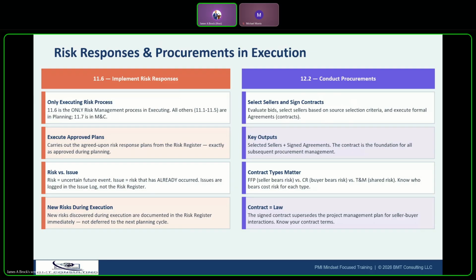Then there is time and material. Time and material contracts are kind of a hybrid of the two, right? So the risk for time and material is shared between the buyer and seller. And it's good for unclear scope where you have a kind of fixed ceiling price, or you can only spend this much money kind of deal, right? So time and material is good for that.